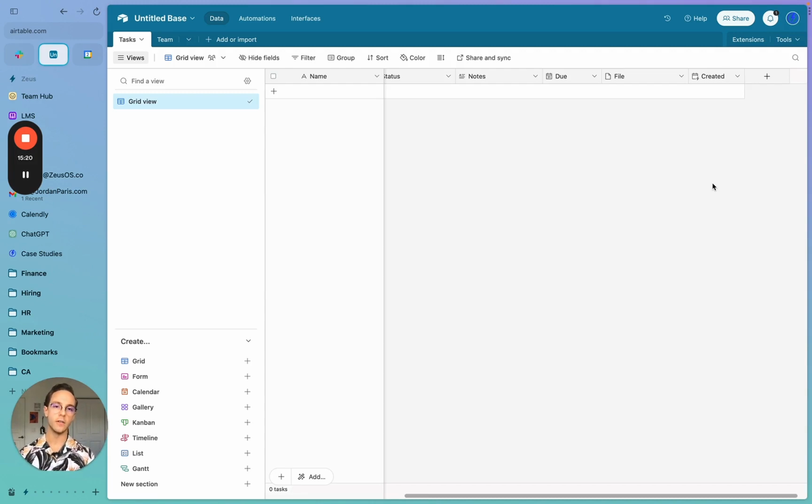And then the other one that we'll create is an overdue task notification. So as soon as the task becomes overdue, the owner and manager will be notified. The manager will get one message saying, hey, this task is overdue. Expect task owner to send you a message in the next 24 hours or the next whatever. And if not, give them tough love. And then the task owner will obviously get a different message like, hey, update manager with a status. What's the status of this task here?